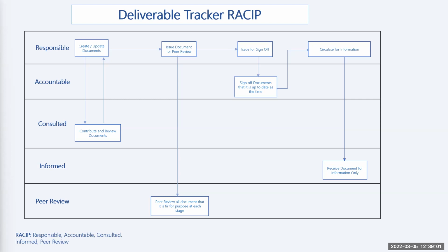You as a PMO, you need to have your deliverable tracker to make sure that you have the right deliverables being tracked, to make sure that the deliverables are the versions that are in there. So the version could be initial. Even your initial version needs to be version controlled. You could have version 0.1 as the initial draft, version 0.5 as the final draft or final initial one for that stage of the project.